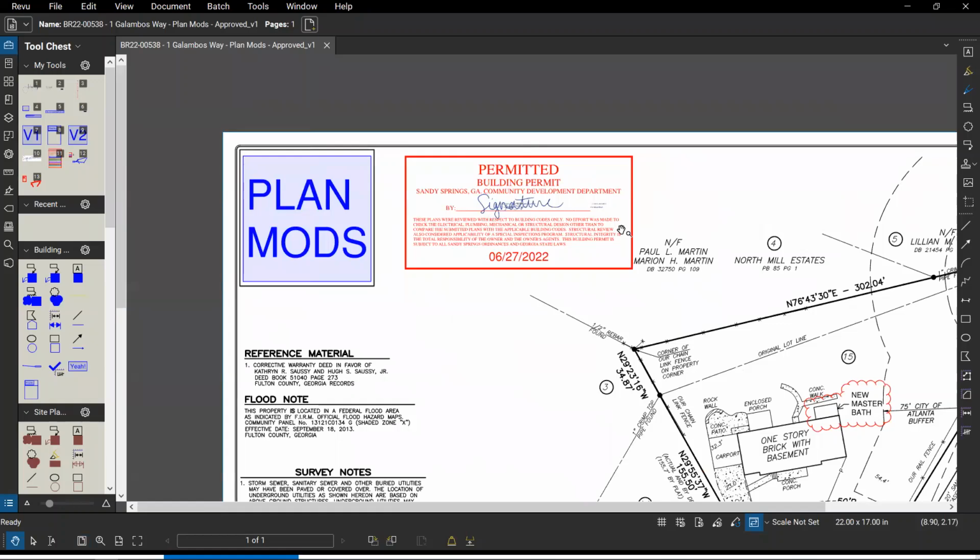But the key thing to note here is, again, it's an entire new submittal. I need all the drawings again because I want to stamp a complete master set and know what was changed. So that's the key takeaway I can really emphasize to you guys: give me a full set with a sheet index, cloud your changes. You do that, we're golden.